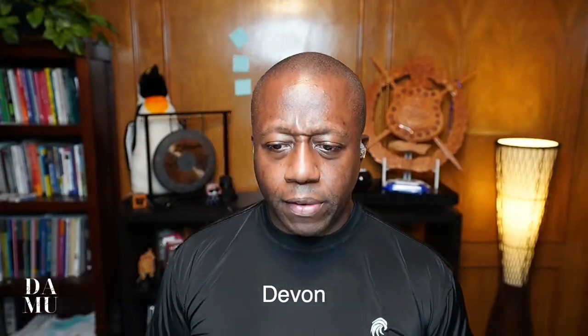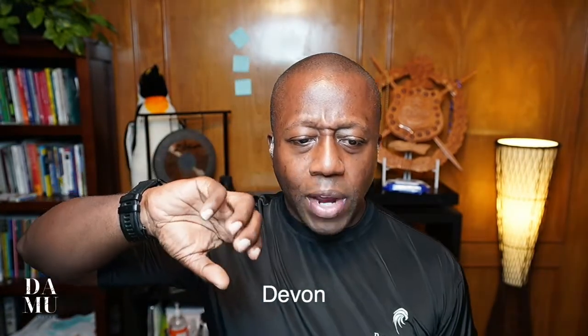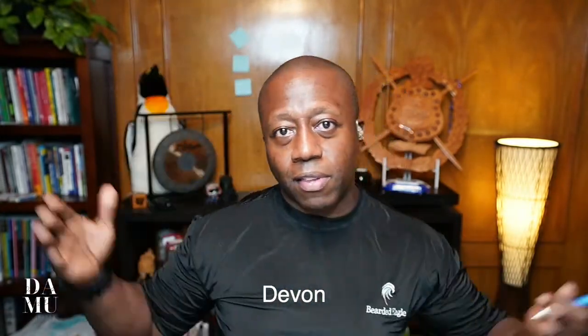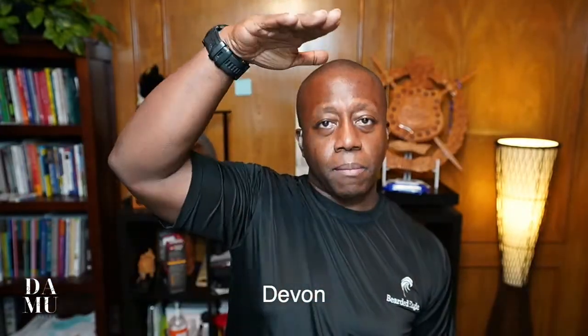Now, the other thing that could have an impact on cost, thinking classic projects and project management, is if you got to buy something, right? If you have to buy something, then it turns into another big bump in terms of cost. So, for example, if we had to procure licenses for something and we had to procure them in the third week, well, in the third week, we see a bump. Maybe that's the second sprint. I don't know. But in that second sprint, we see a bump in terms of cost, which again is not the same as resources, considering any kind of money that we spend is going to have a resource burn. But again, it goes back to there could be a bump that would happen.